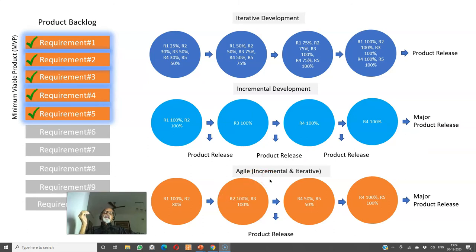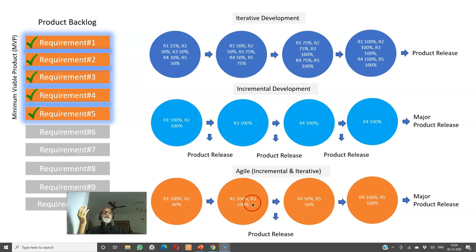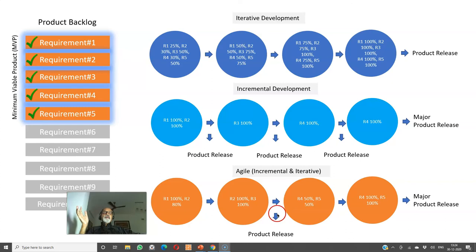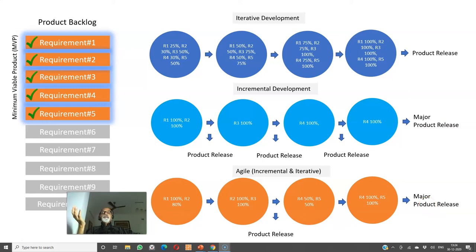Then we have the agile model, which is both incremental and iterative. Requirement one I want to complete 100 percent in iteration one, and requirement two 80 percent. Then I give a demo, collect feedback, and in iteration two I complete requirements two and three at 100 percent, and make a release of requirements one, two, and three at 100 percent — an interim release. Then in the remaining iterations I work on requirements four and five and complete them in iteration four. At the end of iteration four, we make the final release of the minimum viable product. So it is a combination of incremental and iterative.